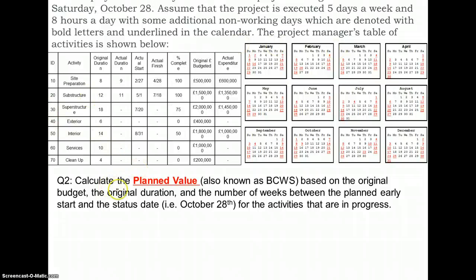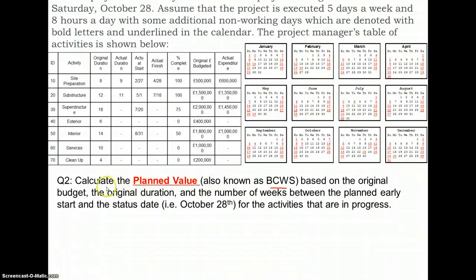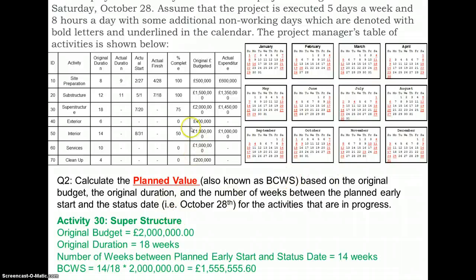Now let's move on to the next question: calculate the planned value, also referred to as the budgeted cost of work scheduled (BCWS), based on the original budget, original duration, and the number of weeks between the planned early start date and the status date. We have to see how much money we should have spent by the reporting date, October 28th. Looking at the superstructure activity, the original budget for this job was two million pounds.